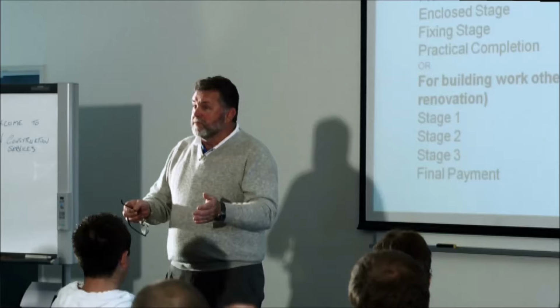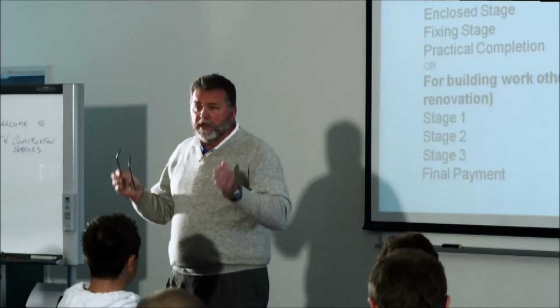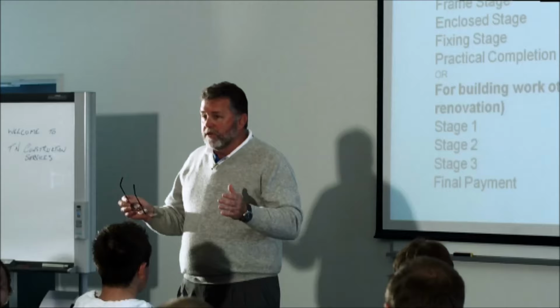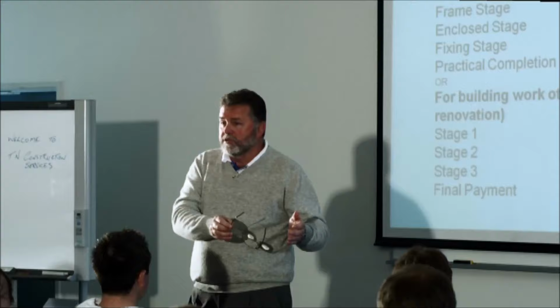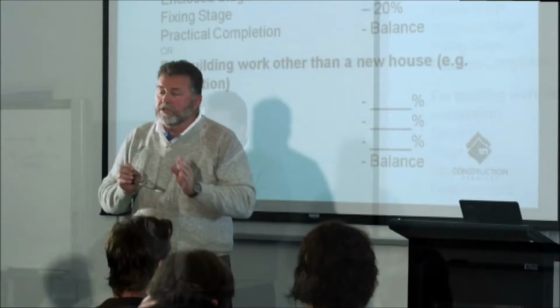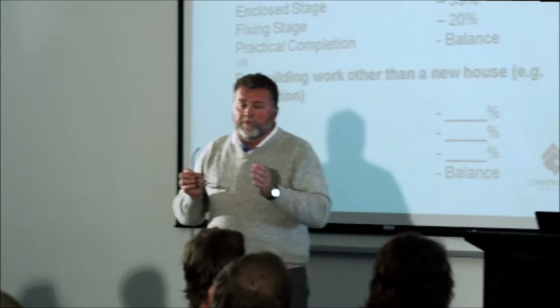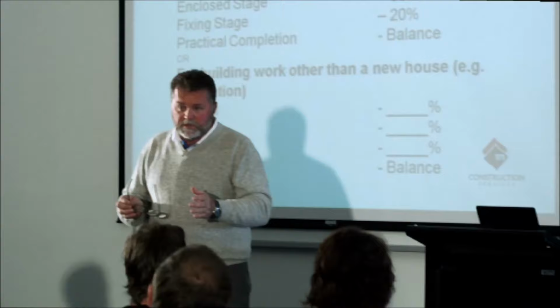Guys, I need you to understand and remember, we're talking about a scope of work here. The moment you take on that complete scope of work and it's outside any insurance that you can get, yes, you can get construction work insurance and public liability insurance, but that particular work is not covered under those schemes. The question was in relation to removing a house or re-siting a house on a block of land. The first part is getting it into the correct position. That's the owner's responsibility, not yours.